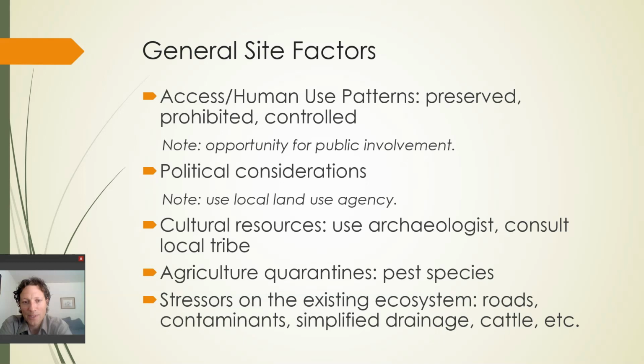Cultural resources. Pretty much any kind of construction project is going to require that you assess a site for potential archaeological impacts. And it's crucial that you don't just check the boxes with the state, but that you actually reach out to the local tribe and let them know what you're doing, and make sure you understand their perspective and any potential concerns. Because you don't want to create tension where it's not needed later on.